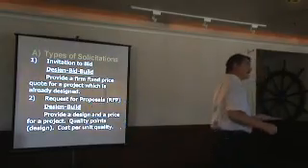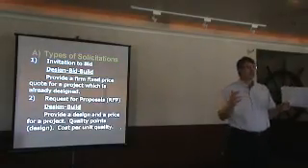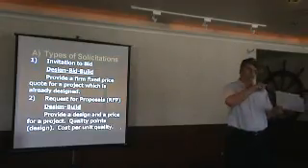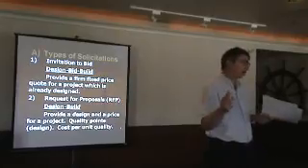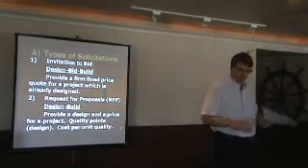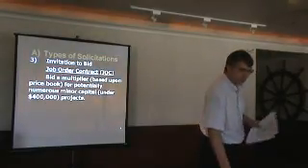There we go. So in that situation, the separate part of your bid is your cost proposal that says what your total dollar amount is, and then we use a multiplier from the evaluation committee on the quality points, multiply that into your total cost, and then rank the bidders. So if you're not familiar with design build, now you are.